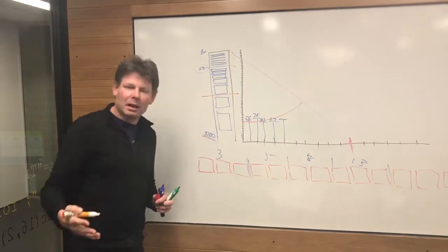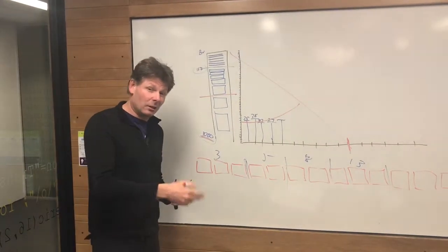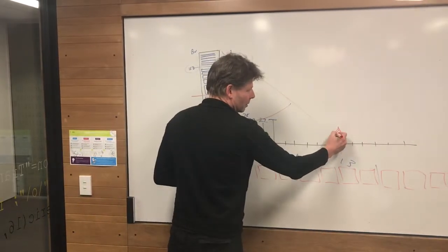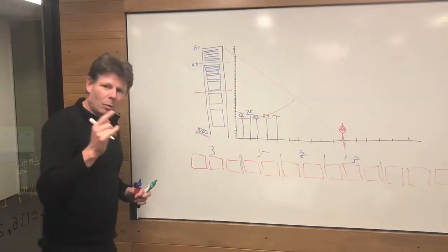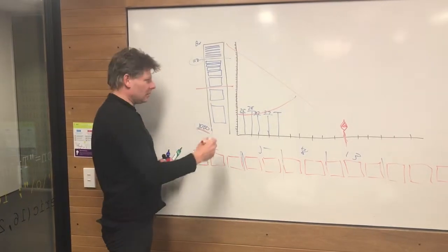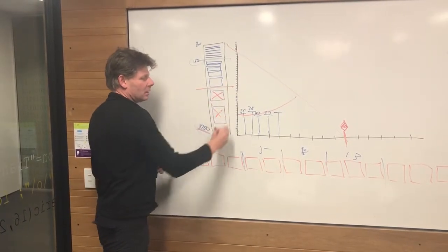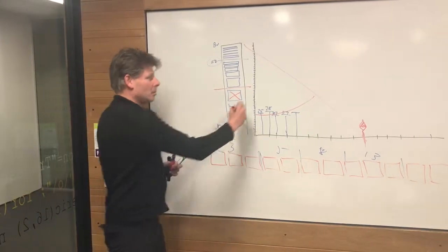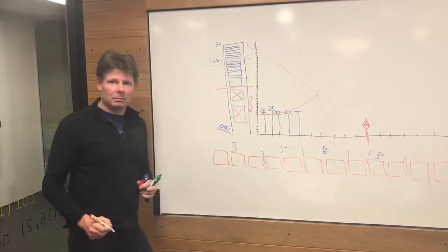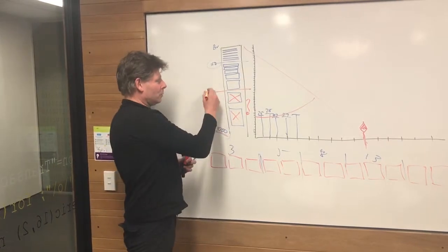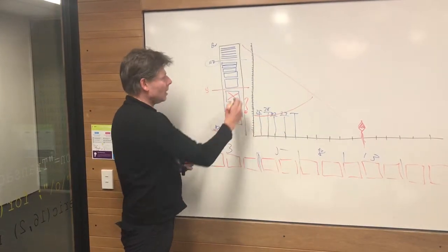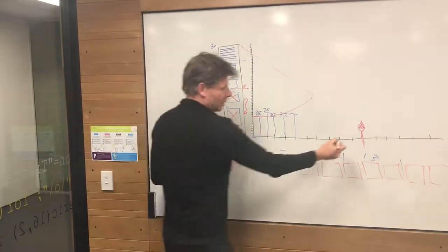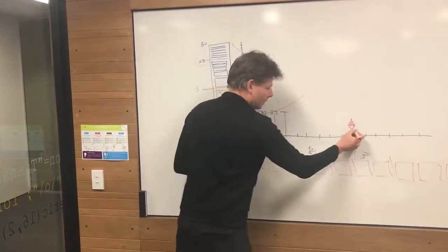We knew we had a drop dead date because it was a banking app that we wanted in the market before Christmas. So we needed to go live in about October, November time. And we had a commitment for mid-October to go live then. With this data, this is empirical data, it was a very easy conversation to kill these items of functionality there. Perhaps we can deliver them later on, who knows? But we only had a fixed budget in any case for the time, and it was much easier to do the work here. As it happened, we delivered a week late.